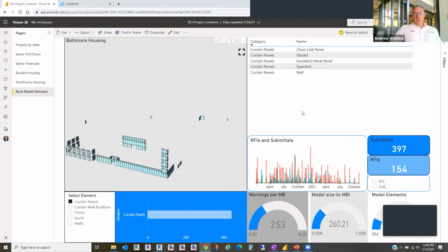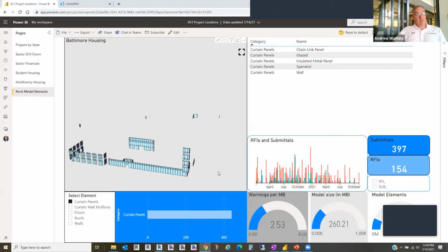And what that reveals, or can start to talk about, is maybe we work with this contractor or this owner fairly often, and we can start to get a sense of how much they hammer us with paperwork. We all know that happens, right? And we can talk about staffing for the next project that might have this contractor or this owner on it. Or maybe there's a fee adjustment that we need to start making if we end up not making as much money as we thought we were going to in a specific phase because of CA efforts. So it really starts to reveal some interesting data about that effort during construction over time.